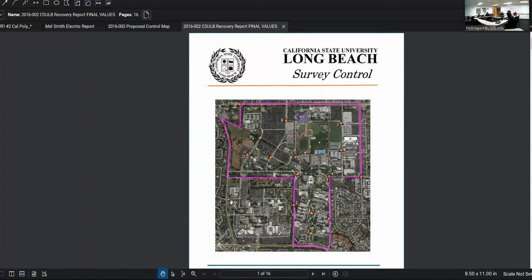Yeah. The other thing also is, they don't reference. Now, I think most of your projects are referencing the monuments, but in the past, they did not reference these monuments. So when you bring them in on a site map that's coordinated, they don't line up with the current monuments. So it's important that these monuments be followed as well.